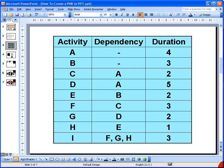Here I have a table listing activities, their dependencies and durations — this is typical of what you'll get when drawing a project network diagram or in a test. I've got nine activities labelled A through I. In the middle column are the dependencies: activities A and B have no dependencies, but C depends on A, D depends on A, and E depends on B, right down to activity I which depends on F, G, and H. The third column shows the duration of each activity — in our example, measured in days.